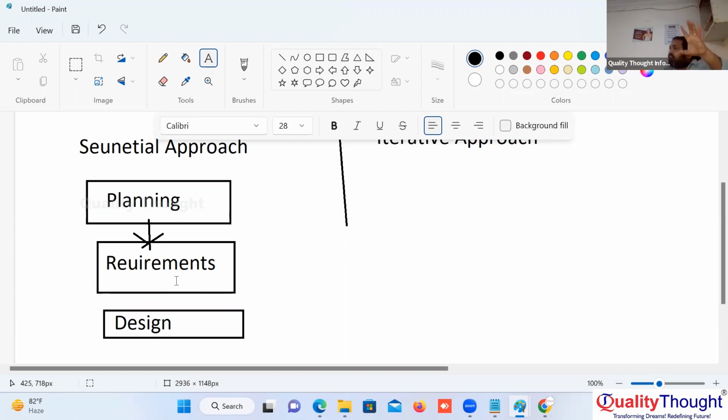So what is the advantage of the sequential approach? For example, you are building software in a known domain, and known domain means, let's say Microsoft has built projects in the same domain for the last 20 years. Fixed requirements, so the scope of the project is fixed. It is not going to change. So known domain, existing requirements, existing technology, old technology project, Java project. So it is not a sudden surprise to developers. For those kinds of projects, up to some extent, the sequential approach is okay.